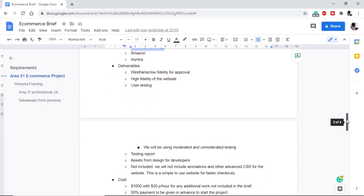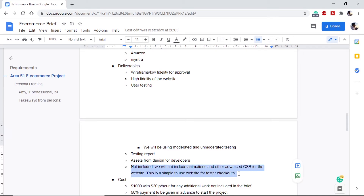After this comes a very important part of our brief: the deliverables. This tells the client exactly what we will deliver and what we will not, setting clear expectations on both sides. First, we will deliver the wireframe for approval. Once approved, we move to the high fidelity design. After that comes user testing — both moderated, where we are present with the user, and unmoderated, where testing happens without our team. We will then provide a user testing report and the exported design assets for the developers.